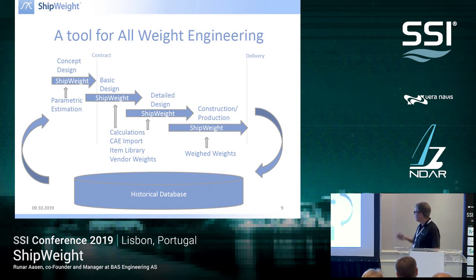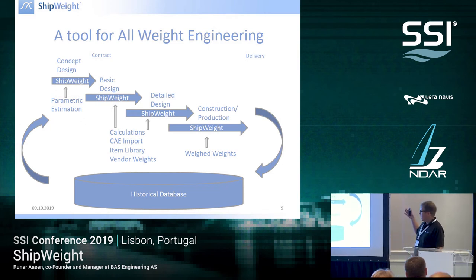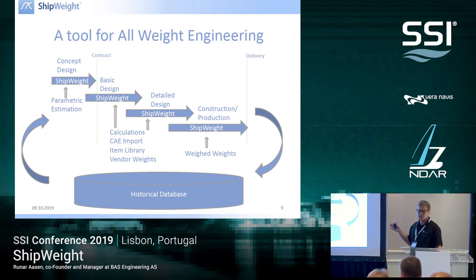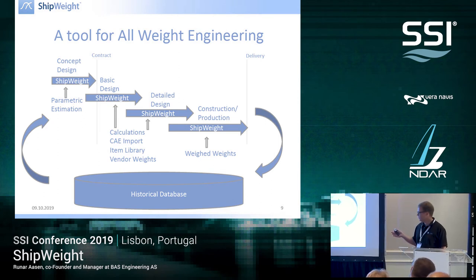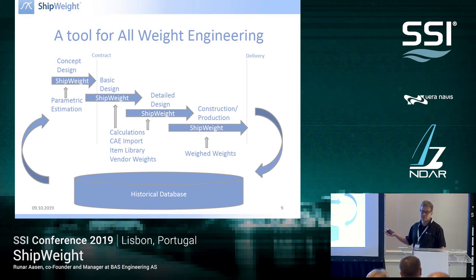Beyond that, when you've used ShipWeight for a project and corrected the final weight database towards the inclining test reports, you export this to a historical database, and now you have data that you can reuse for future projects.